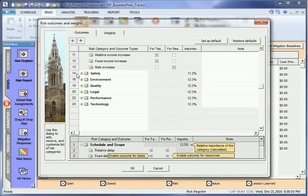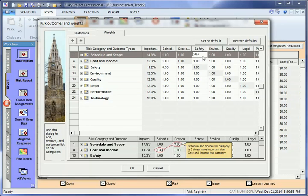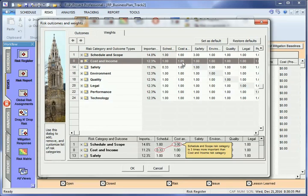Different categories have different priorities. In the weights tab, for example, you can specify that safety is three times more important than duration. This information is then applied towards ranking risks in the risk register.